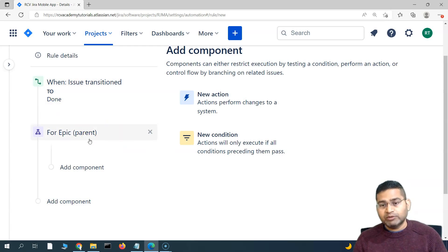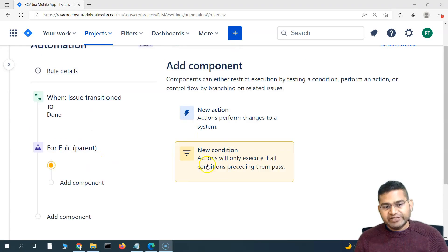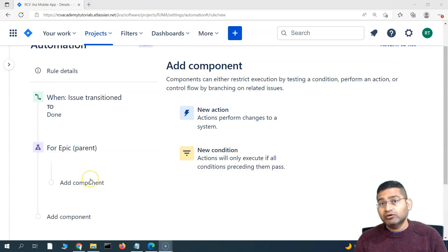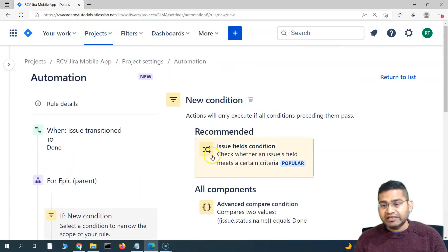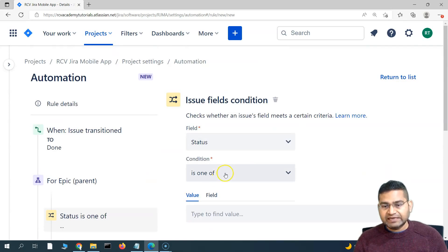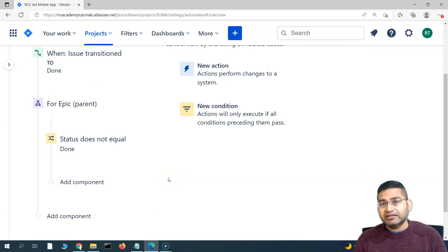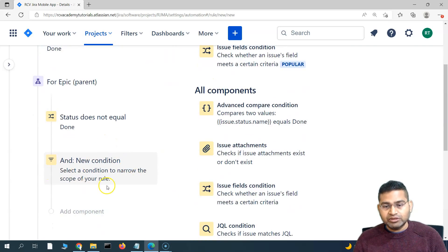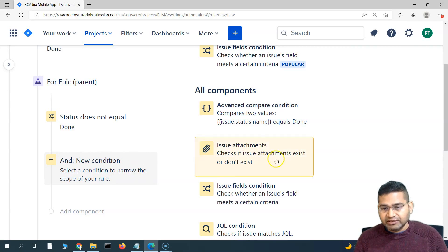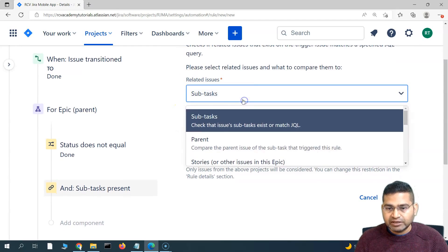If there is an issue linked to the epic — most probably a story — it checks which epic it is linked to. As soon as the story is transitioned to Done, it performs that check. The next thing is to add a condition checking that the epic's status is not already Done. We add an Issue Field Condition: status does not equal Done. Along with that, we need another condition to verify that all other linked issues in the epic are also Done.